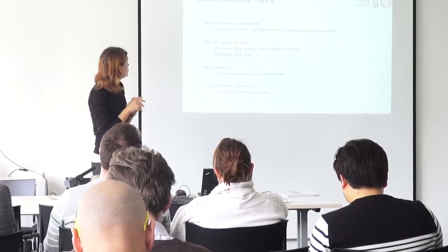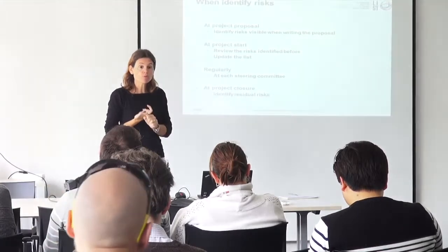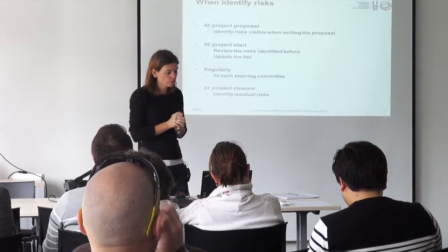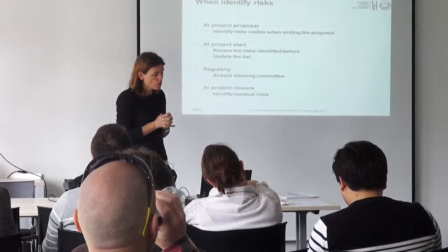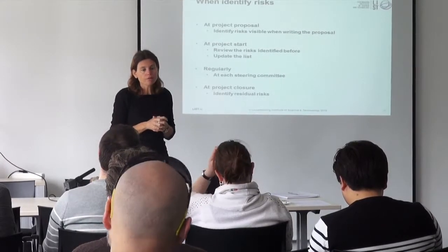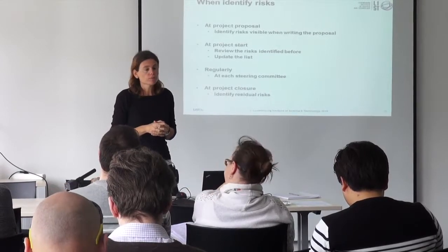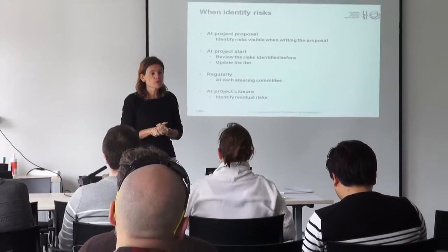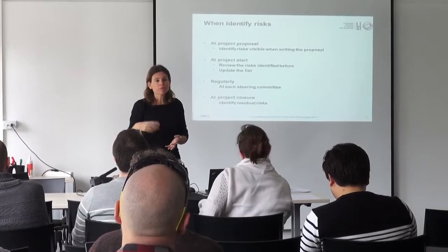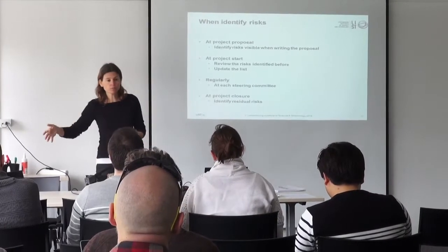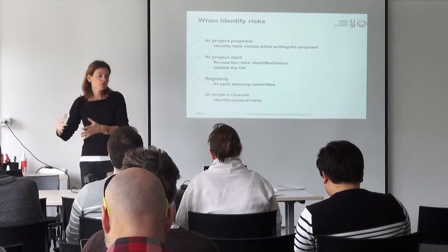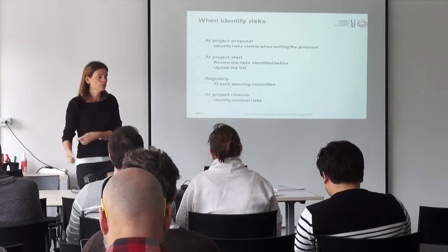So when do you identify risks? During the project proposal, of course, you need to do some thinking about risk at that time. Of course, there are some risks that are visible at that time, and there are some risks that will come later on. Because when you do the project proposal, you might not know all the resources that will actually work on that project. The fact that a person is not available enough because they are already busy with 10 other projects, you might just discover really when the actual team is put together.